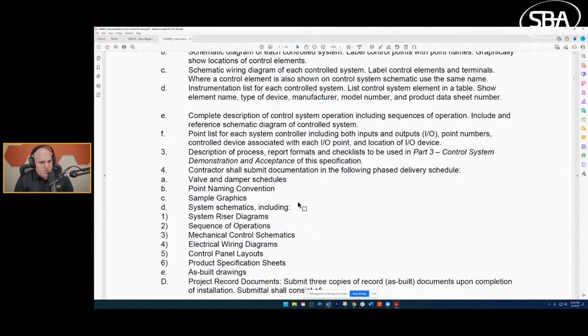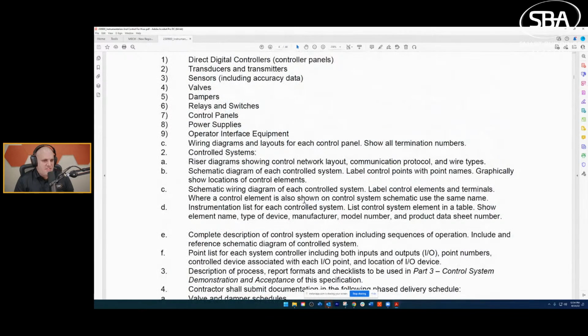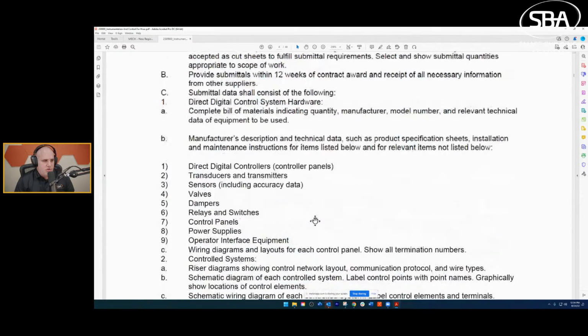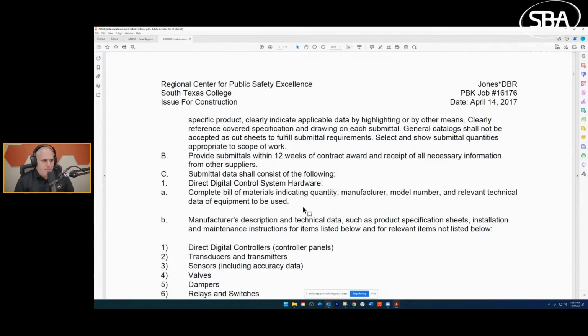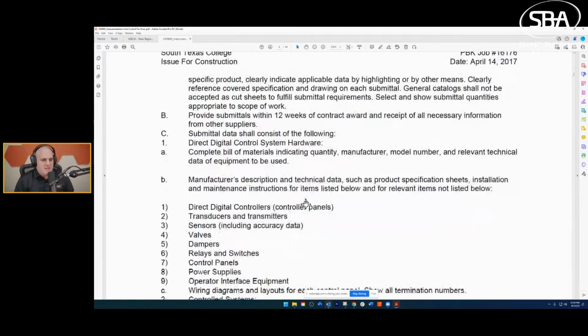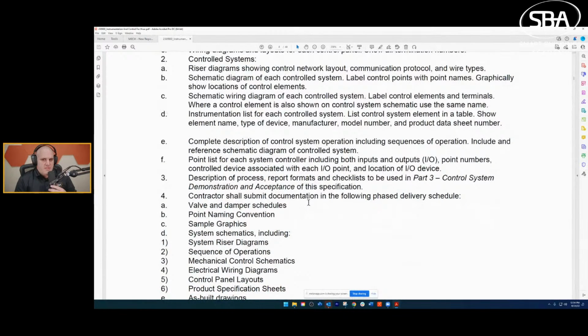Does it need to be electronic, etc.? I've seen submittals rejected for stupid stuff like, I wanted it 11x17 landscape and you did 11x17 different layout. So don't get your submittals rejected because you don't read stuff and understand the basics of the basics. Get your submittals rejected for at least something that is difficult.